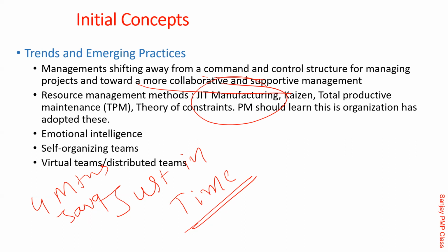But what could happen is that the moment development starts, you might realize that when the Java people are there, they should be good in Spring and Hibernate. I'm just taking some names; this could be wrong. This is more specialization within Java. Now, this clarity you may not have had 4 months back, so the recruitment, the requirement, the interviews, you may not have considered this. If you do it just in time, you would have got an advantage.